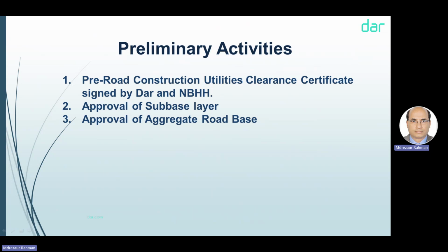Okay, so the second step is approval of the sub-base layer, and the third step is approval of the aggregate road base before starting asphalt.